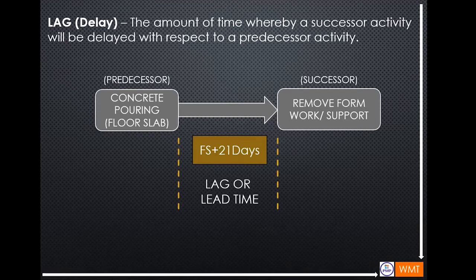So a lag or delay means the amount of time whereby a successor activity will be delayed with respect to a predecessor activity. So for this example, the predecessor is a concrete pouring or floor slab. And then the successor is removing the formworks or the support.